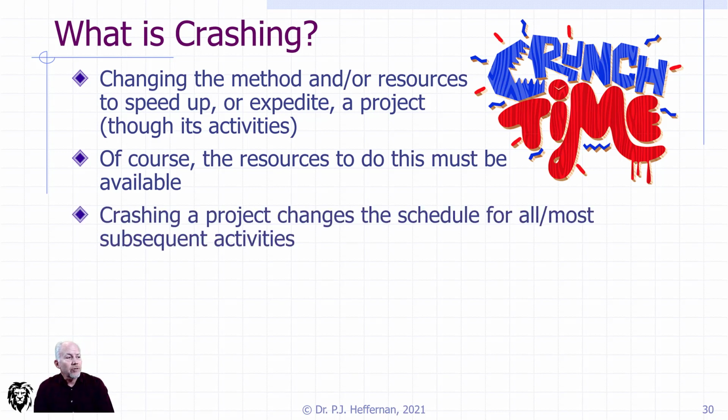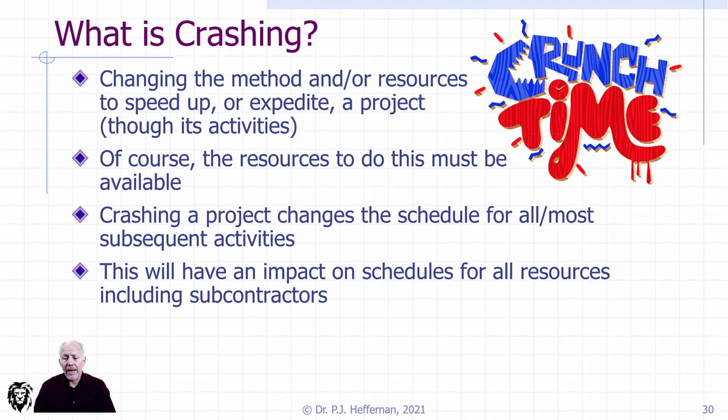We also should be conscientious of the fact that when we crash a project, all of the subsequent tasks that follow it also have to be affected or brought forward, and so they also have to be possible to do. Otherwise, we're spending money to crash a particular activity without the impact that we need it to have. And so that impact is complex. All those interdependent resources that you're sharing with other projects have to be able to shift in time in order to accommodate the crashed project. Otherwise, it's not really worth looking at.